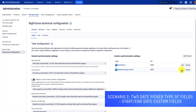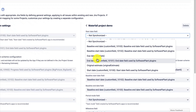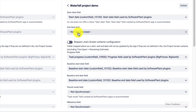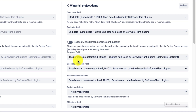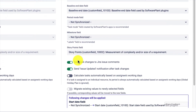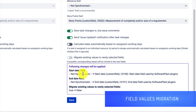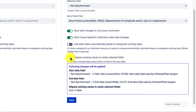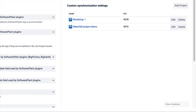We are back at the task synchronization page in Jira administration. Now let's set the start date and end date synchronization to the default fields, which are the start date and end date custom fields created by the app during installation. Whenever you change the mapping from a synchronized field to a different one, you will be able to migrate the existing values, which helps a lot if you plan to make changes in your Jira. However, without the synchronization, this is not possible.